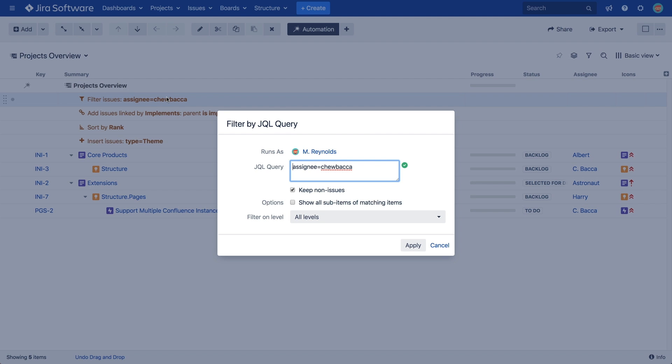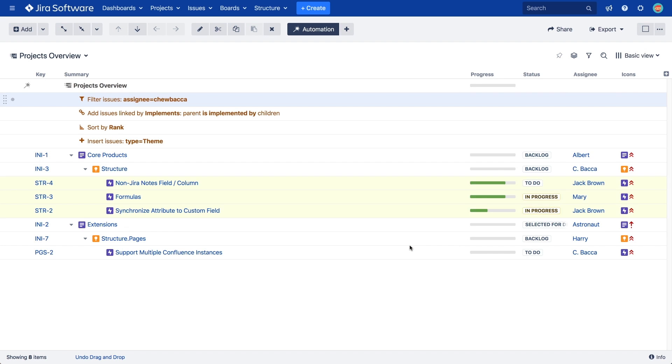For example, if we filter by assignee equals Chewbacca, selecting this option will also keep the children of any issues that are assigned to Chewbacca, even if the children are assigned to someone else.